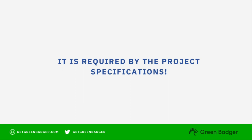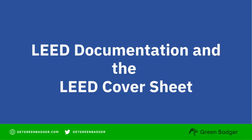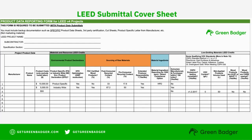Most of those details are in the project specifications and are a required part of your overall product submittal. We're going to show you what LEED documentation looks like and the importance of the LEED cover sheet. The LEED cover sheet is just like your normal submittal cover sheet in that it identifies what products you're using and what they cost.